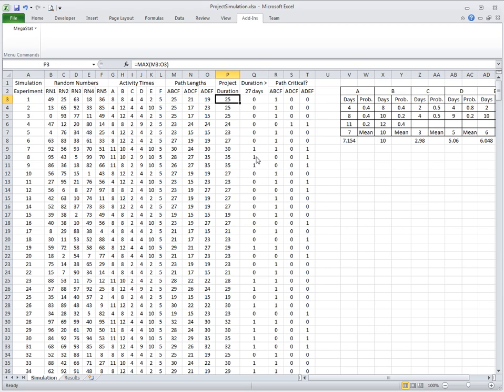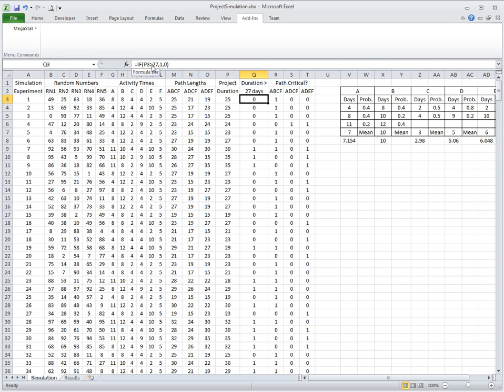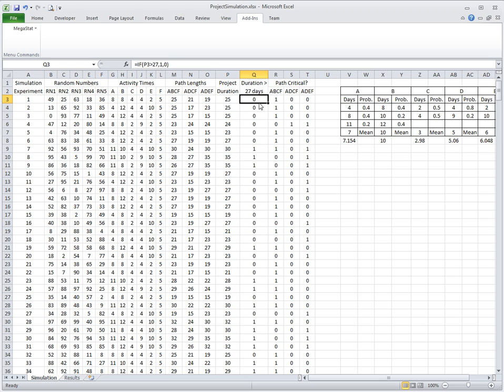Project duration is computed as the maximum of path lengths. In this experiment it is 25. We have an IF function that computes whether the project duration exceeds 27 or not. If it exceeds it puts 1, if it doesn't it puts 0.